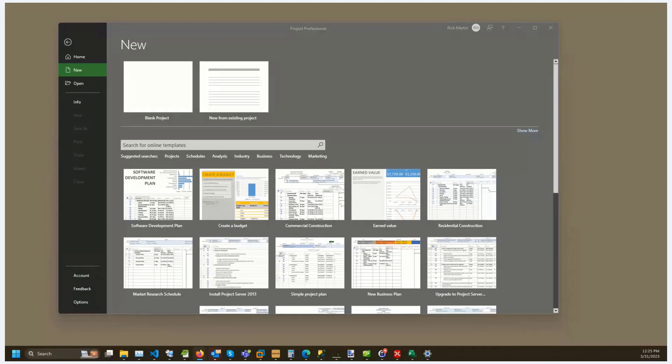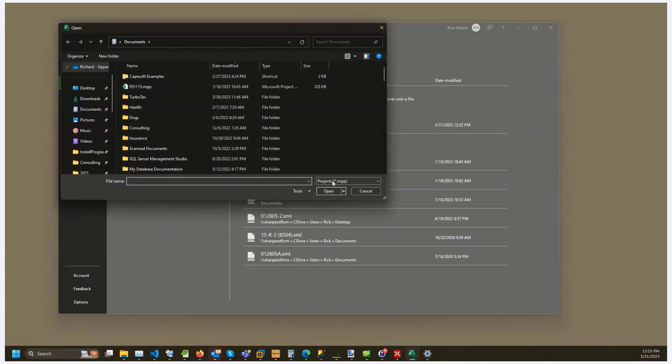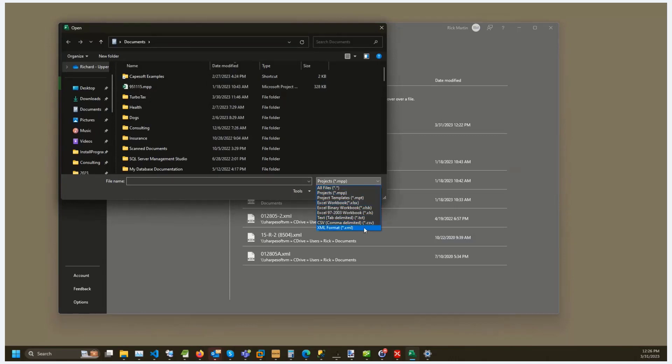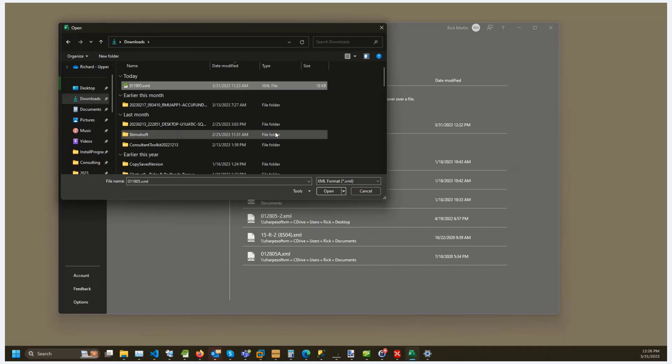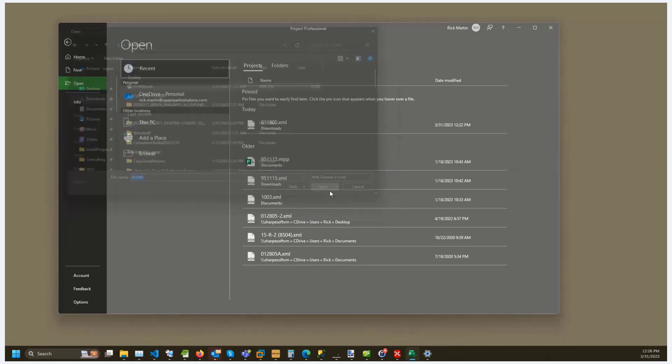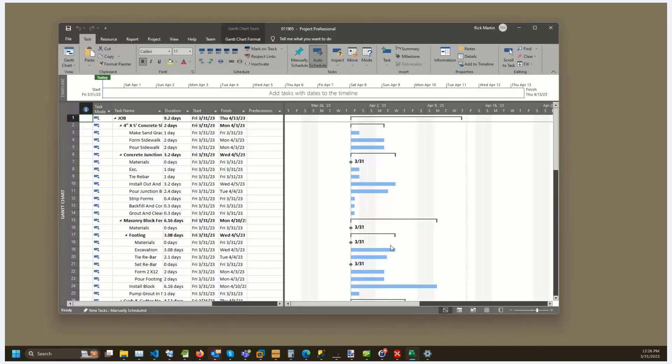Now inside MS Project, we're going to select open and then browse, and then we're going to change the file type to xml to make sure that our file appears. Navigate to our downloads, load our file, click open, and then in the wizard we're going to save it as a new project.